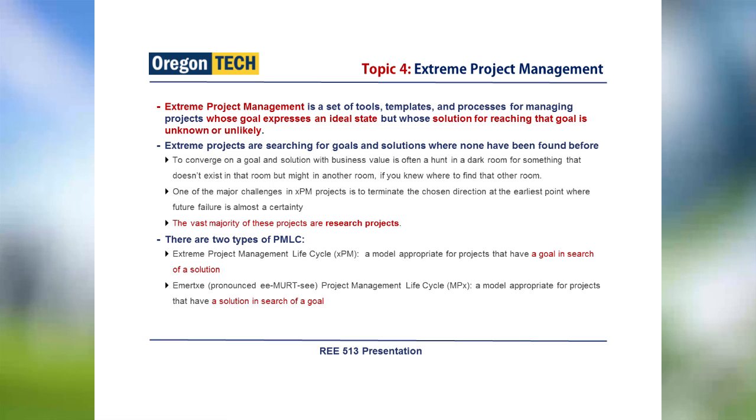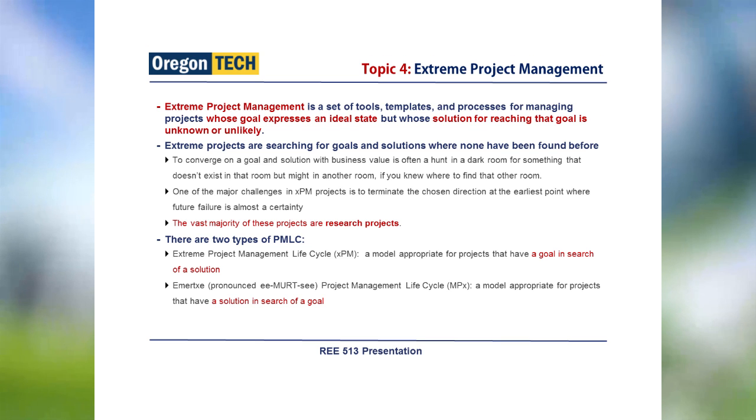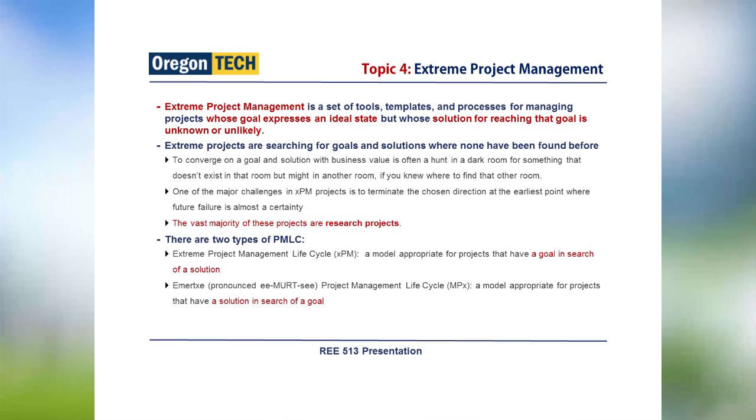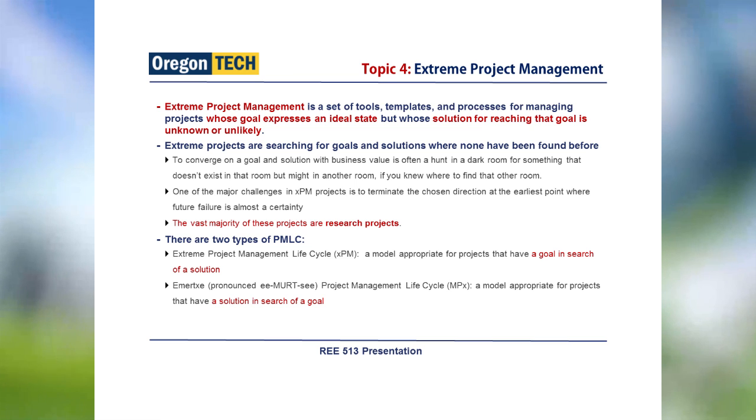There are two types of PMLC model. The first model is called Extreme Project Management Life Cycle (XPM). This model is appropriate for a project that has a goal and is searching for a solution. Of course, the goal is not clear. It is expressed in an ideal state. The second model is called Immersive Project Management Lifecycle (MPX). This model is appropriate for projects that have a solution in search of a goal. Of course, both are not clear.